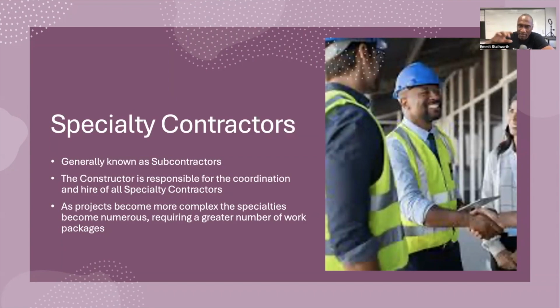I base my quotes on a prior job. But then I have a specialty line item at the bottom for things that may be a little bit different on this house that I didn't see on the other house. Like one house may have a full masonry fireplace, but I didn't have it on the other house. That's a specialty item. One of them may have hardware on the garage doors. That's a specialty item. I had to put that in there.